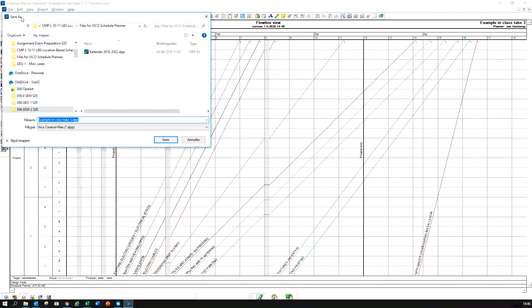The task, which is for you to find out yourself, is working on methods or how to accelerate the completion of these dates. You see you have some empty spaces here. That means you're wasting time. You are not working effectively in all locations. So you need to synchronize the work. You need to accelerate to see if you can make the curves steeper.